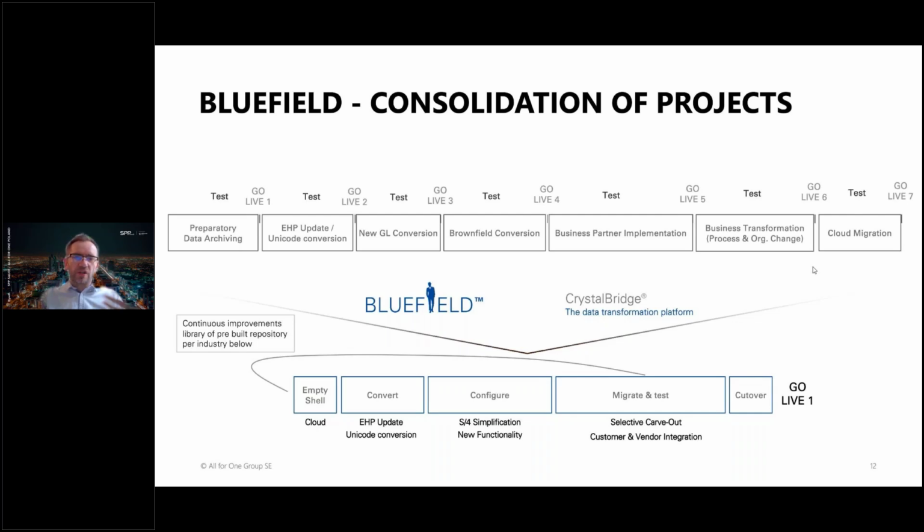Because when we have already started the project, then it's difficult to make a modification, for example, to switch from the standard approach to the near zero downtime, because we need to bring new objects into consideration and we need to start to build these objects. So if the customer decides in the middle of the project, then it can be an issue, but all the issues are there for the solution. The more issues we can identify, the better solution we can give.